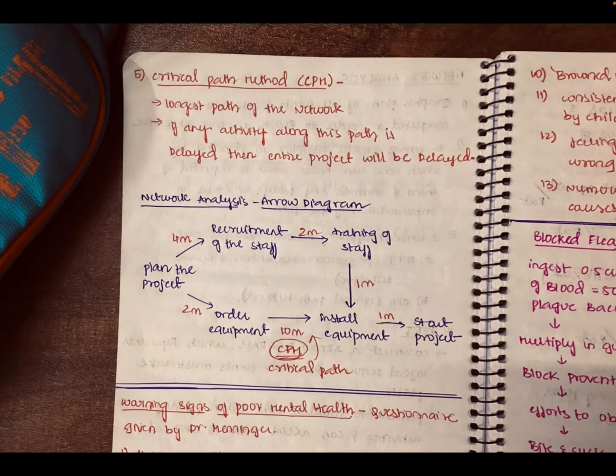Now let's talk about the Critical Path Method. In PERT, there is one activity which takes the longest time — that is the critical activity. It is the longest path of the network. If any activity along this path is delayed, the entire project will be delayed. Looking at the arrow diagram example: we plan for the project and order the equipment, which takes two months, and the installation of equipment requires 10 months.